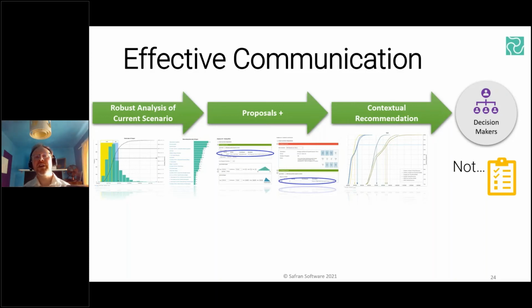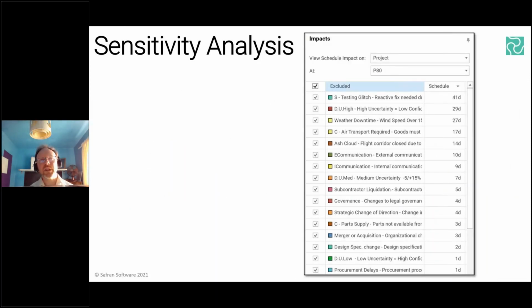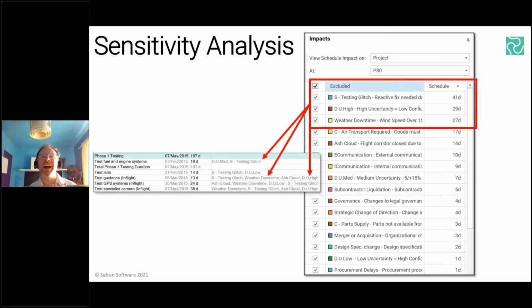But as a profession, we should be moving away from the days of simply mirroring back to the senior team the same list of top 10 risks that they probably provided to us in the first place. So let's give them a choice to make that has some meaningful ramifications. We can use sensitivity analysis to discover where 80% of the impact is actually coming from following that Pareto principle, and then discover what potentially is relating these things together.